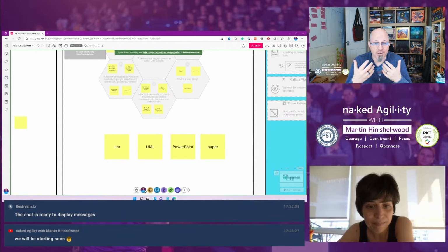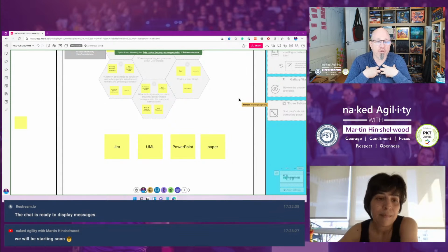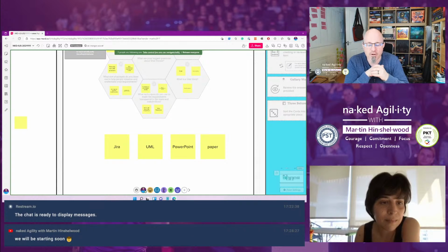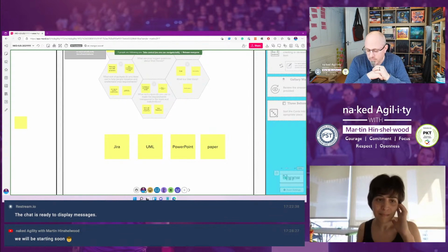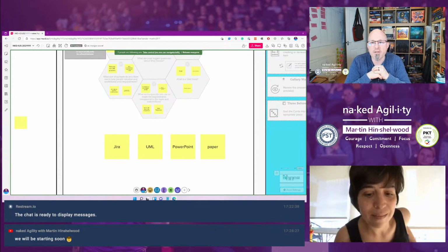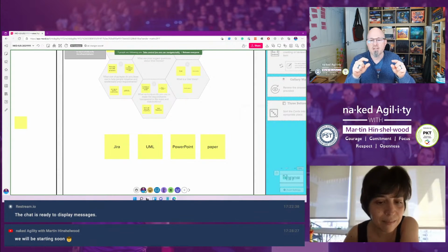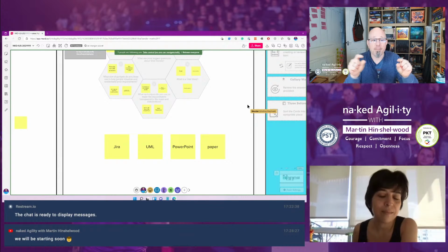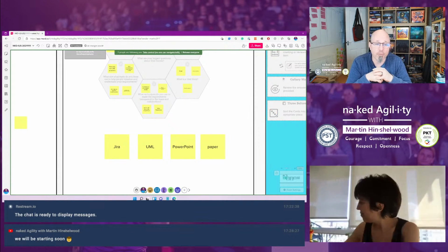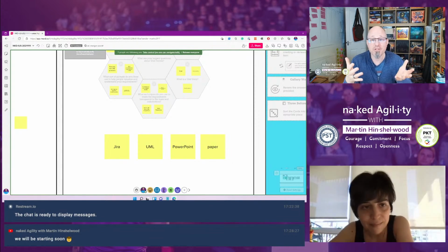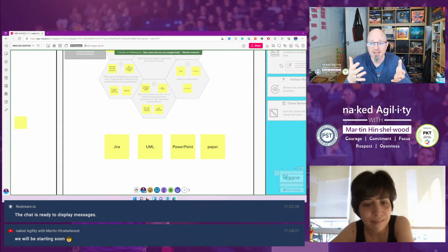When I run with teams, I'm usually using Azure DevOps. That's kind of my preferred tool if I'm online, for other reasons, Microsoft MVP being one of them. But I usually give everybody on the team admin. I make the group for team members, that team members get added to, and I put it in the administrators group for that project, because I don't want them not to be able to do something if they need to be able to do it. Everybody should be able to collaborate together.